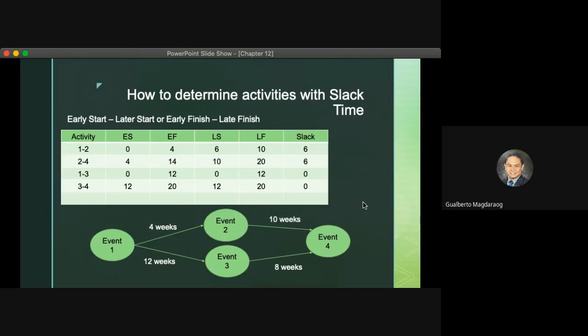Okay, another way of computing the slack time is to deduct the earliest start from the latest start, or early finish minus late finish. What do they mean by early start, early finish, and late finish?